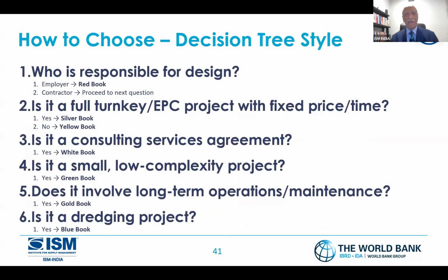How to choose, decision tree style? Who's responsible for design? The very first question. If you, the employer, are responsible, then go with the red book. Is it a turnkey project or EPC project? Fixed price, fixed time? Then go with the silver or yellow, depending. Is it a consulting services agreement? If it's a consulting services agreement, go with the white book. Is it a small contract, low value? Then go with the green book. Does it involve long-term operation and maintenance? Go with the gold book. Dredging, blue. So it gives you a very quick selection of which book I should follow in what situation.